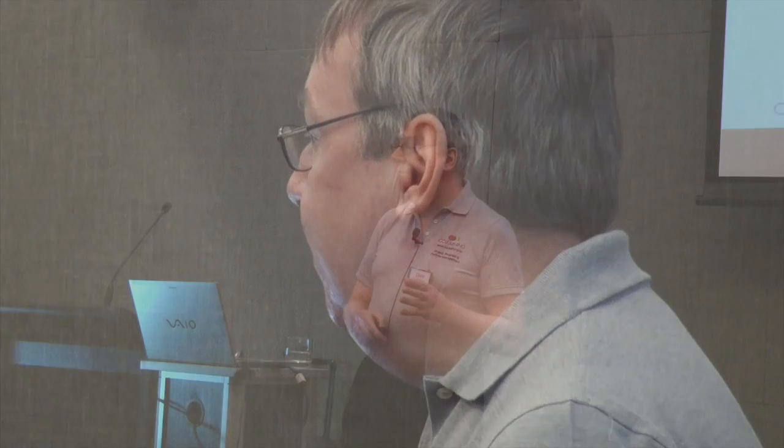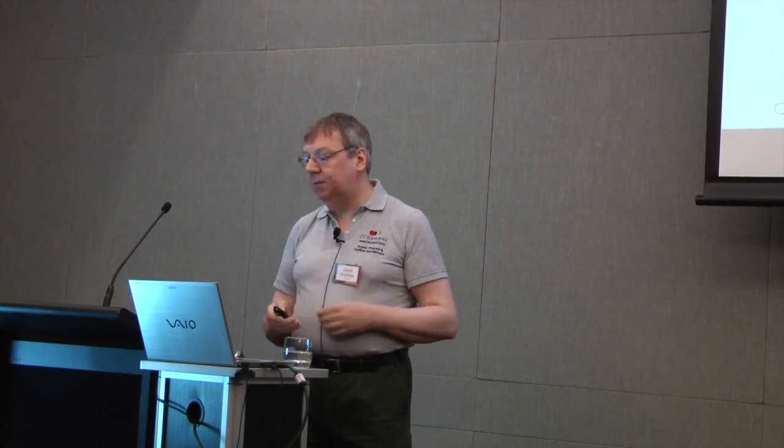Agile says, whatever you actually deliver meets specification. So hence, fix and flex again. Scope is up for debate in terms of the precise detail of the end result. But whatever is actually delivered has to meet quality standards. If you like, it's a modern reinterpretation of the traditional time, cost, quality triangle, which again, contrary to many myths in Agile, is actually still valid now, isn't it? Because the flex area comes in the scope of what's actually to be delivered.